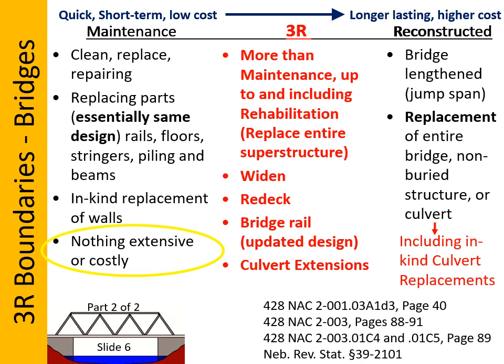Although 3R work extends the life of a structure and possibly makes it safer, it is considered an interim measure. State Statute Chapter 39, 2101 requires roadways and bridges eventually to be brought up to reconstructed standards. Quite often, however, reasonable financing is difficult to come by.